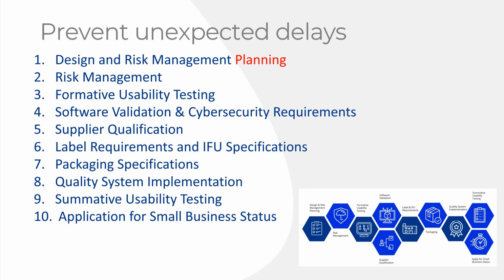Labeling requirements and instructions for use. A lot of companies are waiting for this. This seems to be one of the last documents they give us. There's no reason for it. You should have a finalized labeling and instructions for use before you get to V&V testing.